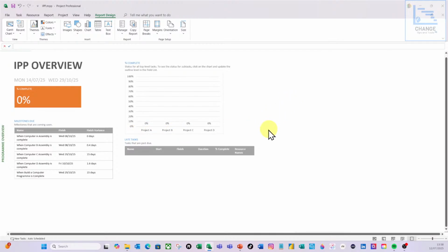Now we know things should have started based on that status date. When we look at our previous live streams, when we built that plan, we used the status date, and we should see a bunch of tasks that should have started. And the reason being, and this is something you have to bear in mind logistically when you're managing it and within your planning standards and your governance process, is that your project managers have to update their status date in line with the central governance. So the reason why we're not seeing any tasks late here, so if I just do save here and do yes to all again, I've got to go into the project plans here, and I'm going to do OK.